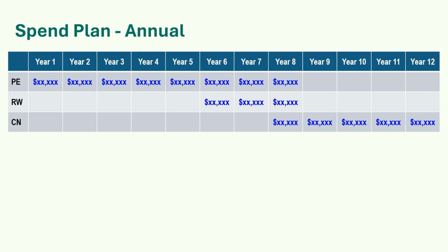See the cost estimating topics on the WSDOT Project Management Guide website for assistance on calculating escalation. You may also be asked to separate state funds from federal funds from any other specialty funds. WSDOT executives can assist with the best method of spending each of these types of dollars for your specific project situation. You now have your spend plan in year of expenditure dollars.